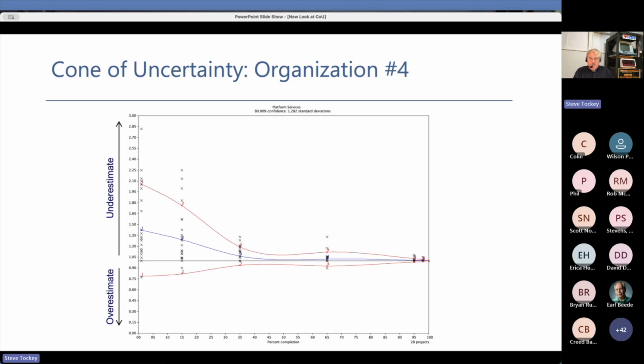And what happened was at that third milestone, the uncertainty didn't go away. It just moved to a different part of the project. Now the schedule is certain because we've committed to a particular delivery date, but what we're actually going to deliver becomes uncertain. So their scope is fixed for the first three estimates, and then their schedule is fixed for the remainder of the project.